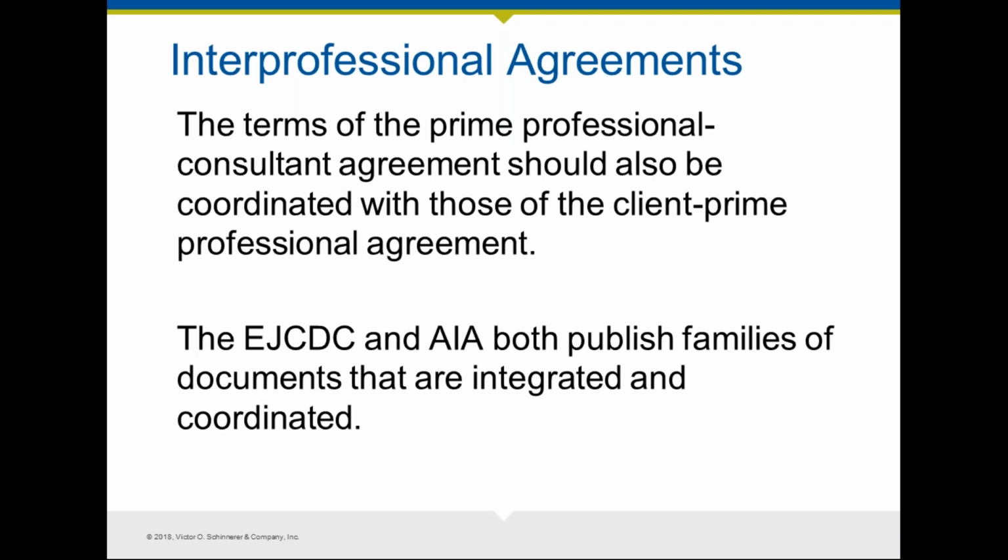But if you're not using standard form documents, these are the things that you need to think about: how are the quality program requirements and responsibilities being passed on to your subs? What are the design criteria and standards that apply to the sub-consultants? Schedule requirements, the budget requirements, the terms and timing of payment.